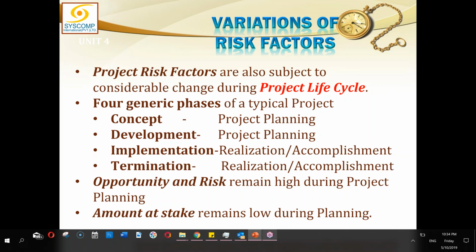There are 4 generic phases of a typical project. Like I said, this is not PMI dictation, but we are just going to take it. And that is conceptual phase, development phase, implementation phase, and the termination phase. Remember, this is not a life cycle. Just imagine that these are the generic 4 phases of the project. In concept and development, we are doing the project planning. In implementation and termination, we are doing the realization and accomplishment.